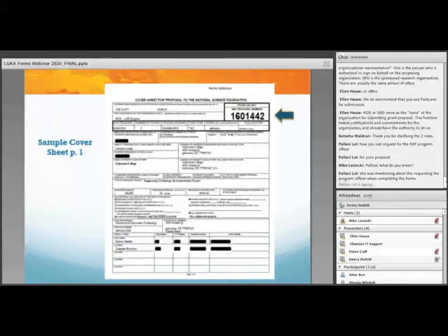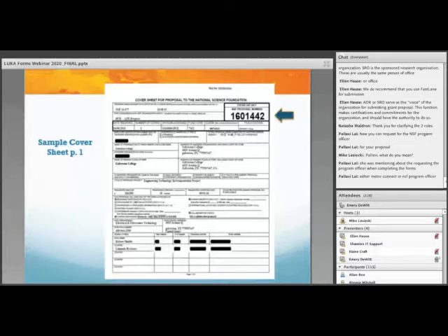NSF is most likely to set your start date for your project on the date you have selected. Consider what will work with your business office and work plan. Most proposals have start dates between June 1 and September 1. Consider the time it will take to get faculty release worked out and when you want it to start. So if you receive your award notification in May and you selected a start date of September 1, you will have all summer to get this all worked out.